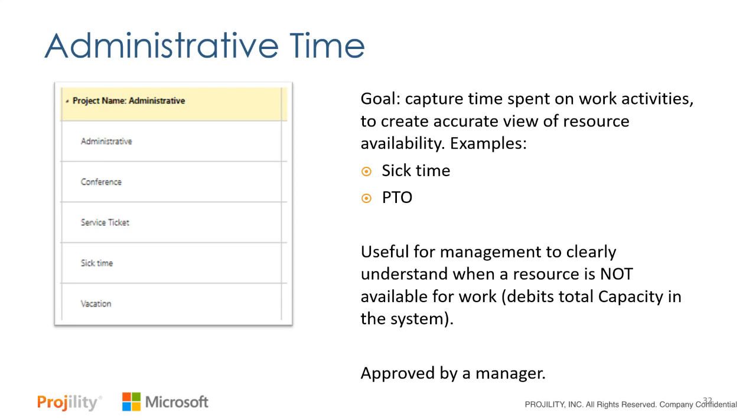What that does is it takes a resource, and if you find out they're on vacation next week, they have 0 hours of availability, but they've been booked on 2 projects that are requiring 30 hours of work, it's going to take their work, a project management system, and push it out to the following week, which may delay work for other people and other tasks in general. You want to see that ahead of time. You want to see it before this Friday.